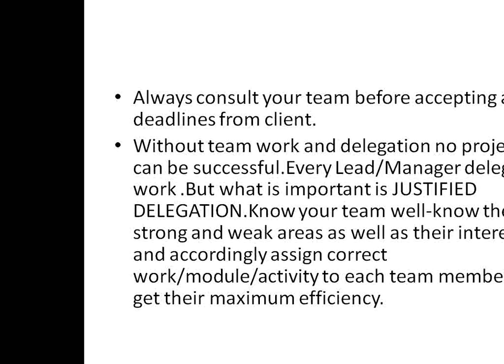Remember one thing. If you really want to be a good architect or a manager or a delivery head, always consult your team before accepting any deadlines from the client. Don't keep your team in the dark. If I commit something to the client, and then my team members, because I will not code, my team members are the actual coders, and they are saying, sir, this cannot be done in this time. So it leads to conflicts. And this leads to resignations, delays and all those things. So I should always consult all the team members, whether he is a junior or he is a senior. Everybody should be kept in the loop and consulted, and then only client deadlines should be accepted or modified accordingly.